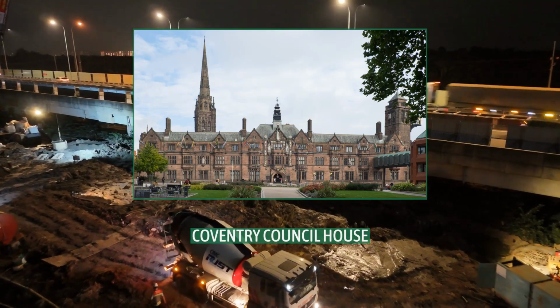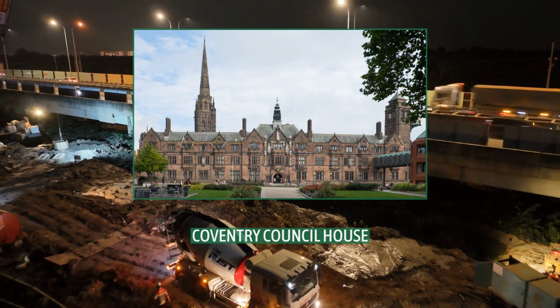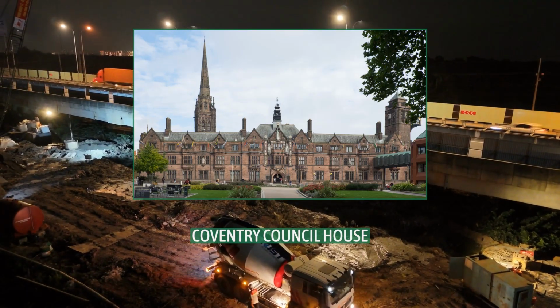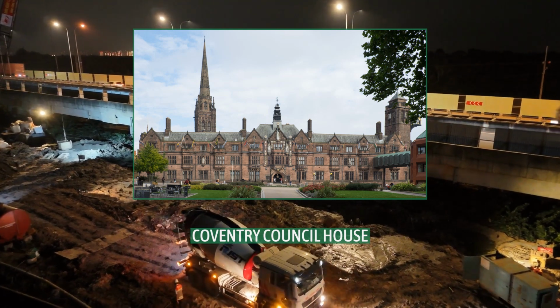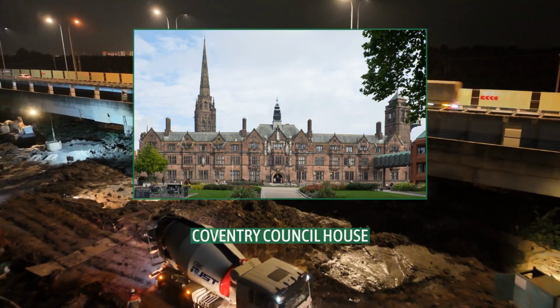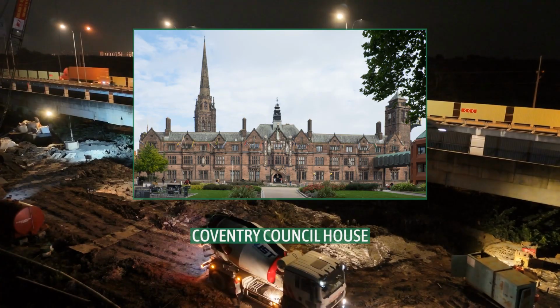By December 1959, the contractors were in the final stages of construction. Several roads at the end of the stretch were closed temporarily to allow it to be joined to the existing road network. Sodium lights mounted on 35-foot poles were installed between the carriageways. Stage 1 was opened on 23 December 1959, Lord Mayor William Henry Edwards cutting a ribbon before being driven along the road in his Civic car.